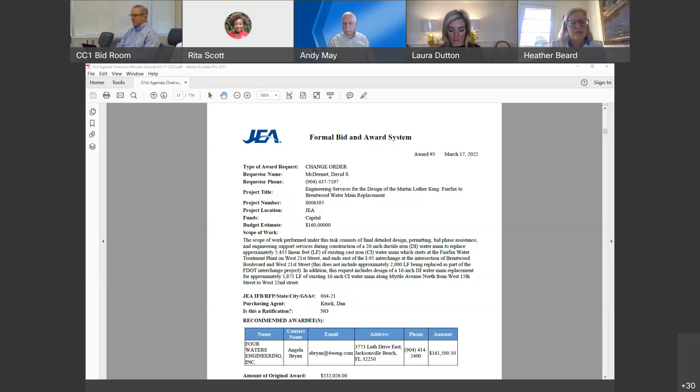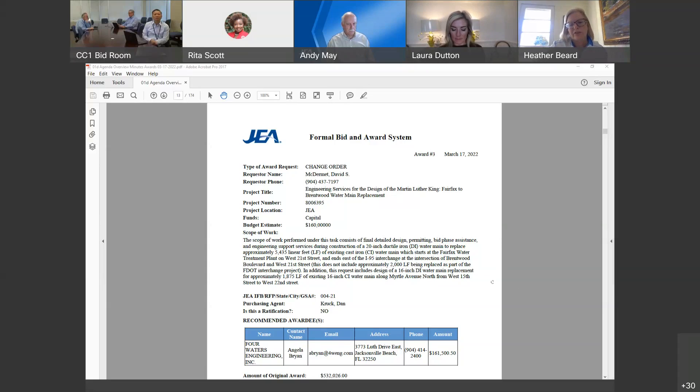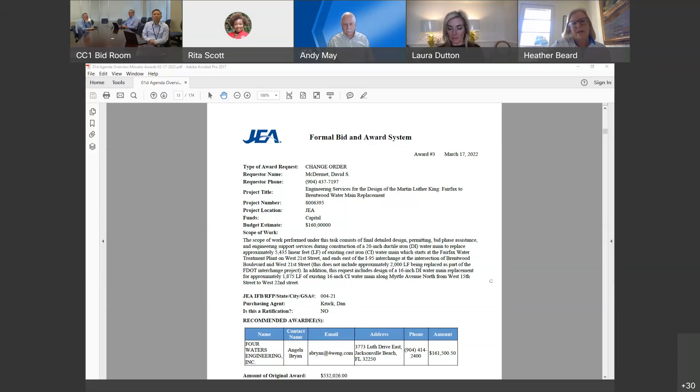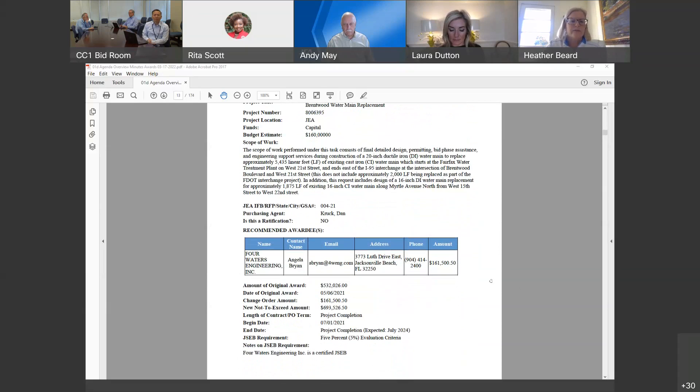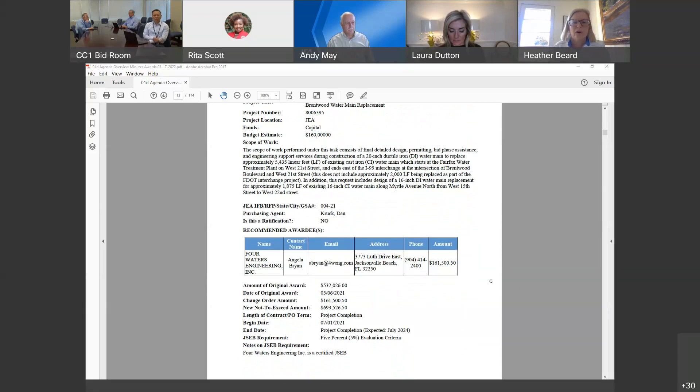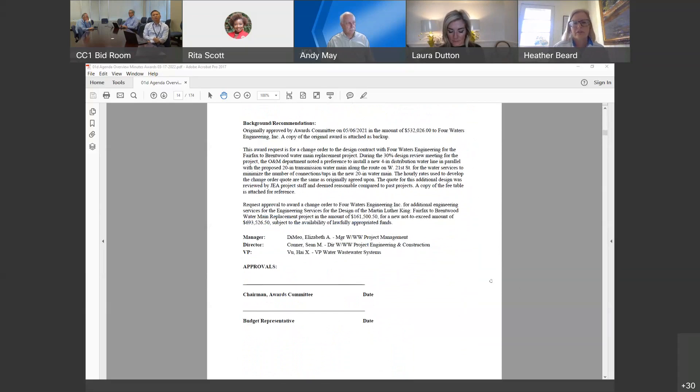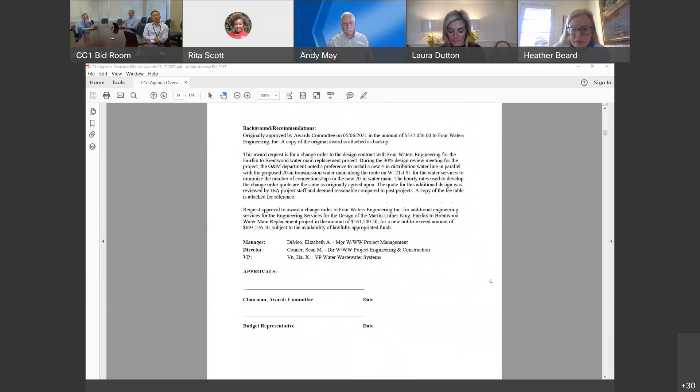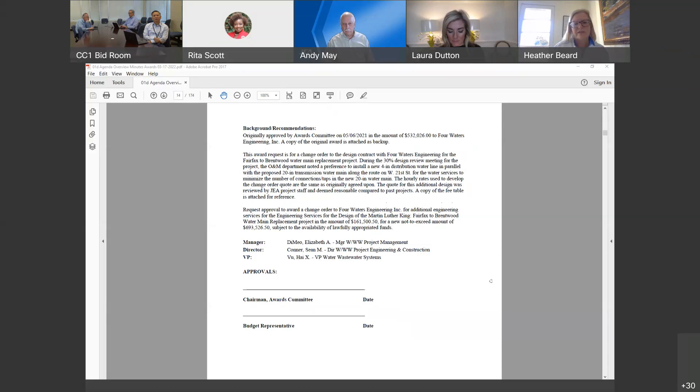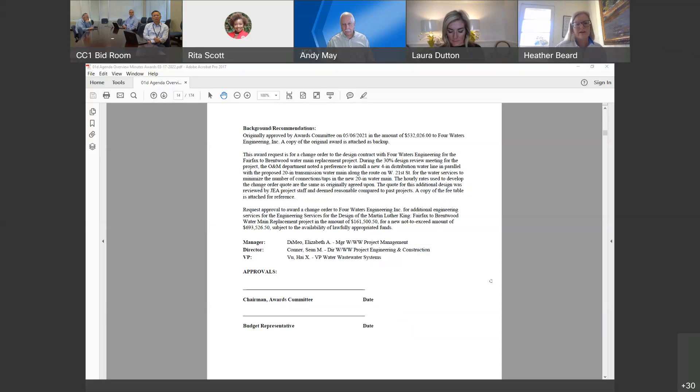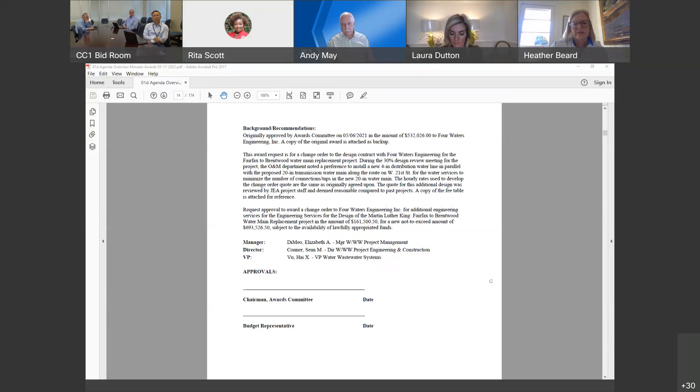Award number 3. This is a change order to the contract with 4 Waters Engineering, Inc. in the amount of $161,500.50. This contract was originally approved by the awards committee on May 6, 2021. This award request for the change order is to revise the design contract for the Fairfax to Brentwood water main replacement project. During the 30% design review meeting for the project, JA O&M Department noted a preference to install a new 4-inch distribution water line in parallel with the proposed 20-inch transmission water line along the route on West 21st Street to minimize the number of connections and taps in the new 20-inch water main. The hourly rates used to develop the change order quote are the same as originally agreed upon, and the quote for the additional design was reviewed by project staff and deemed reasonable compared to past projects.